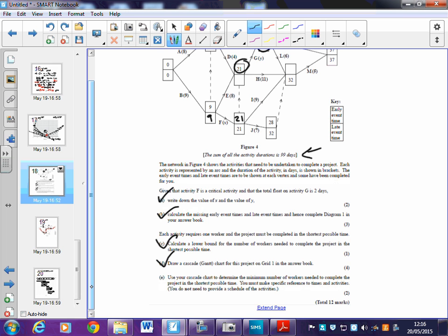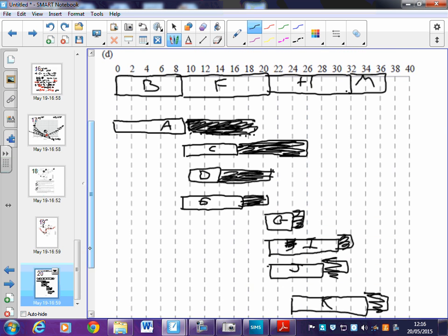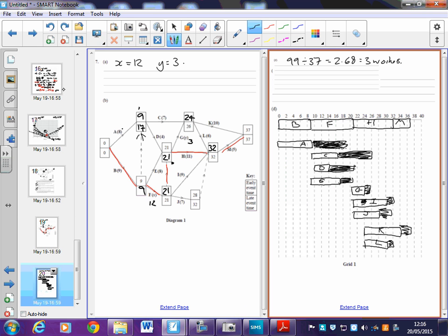Alright, so going back to looking at my diagram on this. In fact, I'm going to make it smaller again. It was almost easier when it was smaller. Right, we need to find a time when the most activities have to be happening. So, I'm going to hazard a guess that it's going to be somewhere around about this area, because you can see we've got the K, the L there, the G there. This one at the start, we can kind of shift the A, the B's, the C's around quite a bit so that we don't have to be doing them there. So I'm just going to try a few different times. This one looks pretty busy, so I'm going to try going down there and see what has to be happening at this point.